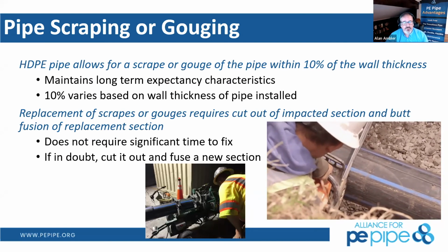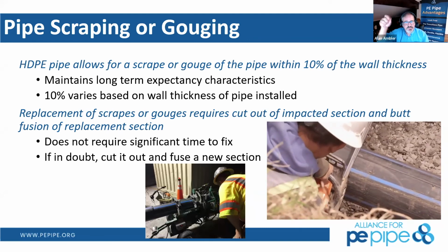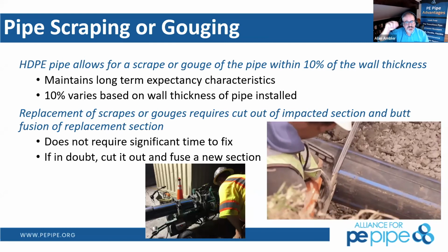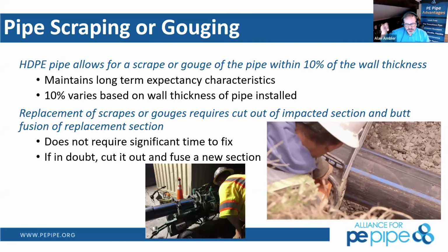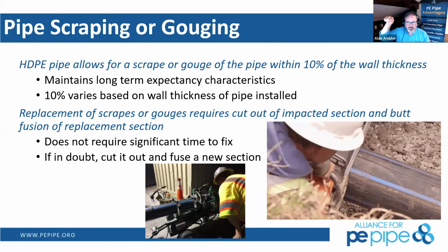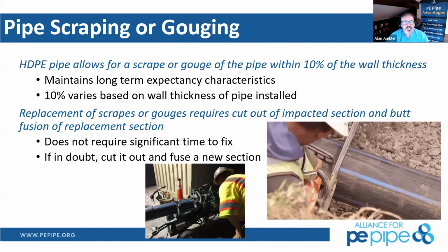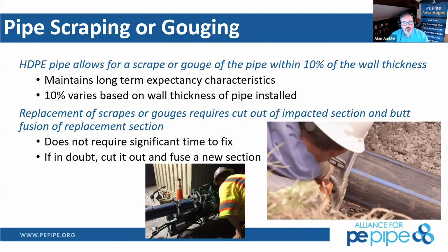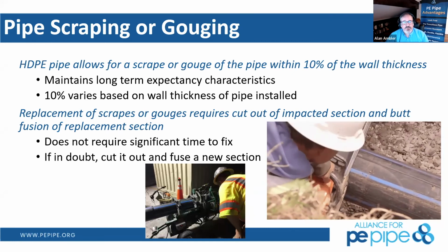And the way that we would measure it in the field is Home Depot has dowel rods that they sell in certain sizes that are specific that can be tracked for that gouge. There's also potentiometers that, as you move it across the surface of that pipe, it'll have a tool that'll stick out and stick into the gouge. But what I say typically is, when in doubt, cut it out, even at 3 o'clock in the morning.